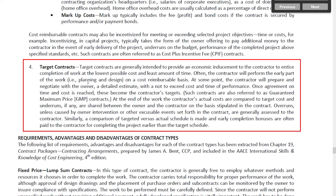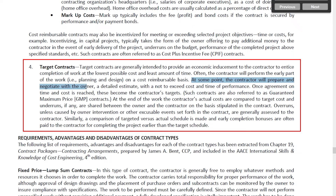After the design is complete, the contractor prepares a detailed estimate and negotiates with the client to agree a maximum amount — a not-to-exceed cost — and a maximum duration for the project. As the book states, target contracts are generally intended to provide an economic inducement to the contractor to entice completion of work at the lowest possible cost and in the least amount of time.